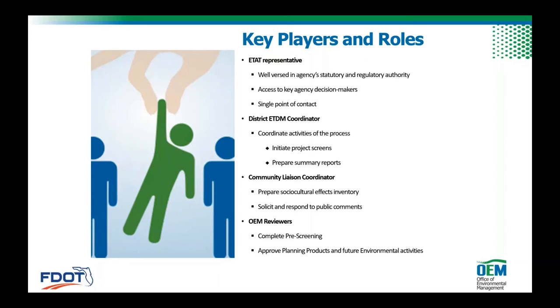So there's mechanisms, there's locations within the tool that will look at the social cultural effects issues. There's 6 of them, and there'll be a spot where the department, before it goes out, will do a preliminary environmental discussion. So we'll share on, you know, what's the potential social impacts of this project in this area, what are the aesthetic impacts and the other issues. And then there's a spot where you can summarize any public engagement activities that have either happened or are going to happen, so that you can have a spot to document those things. Because again, it's, you know, a core part of this.